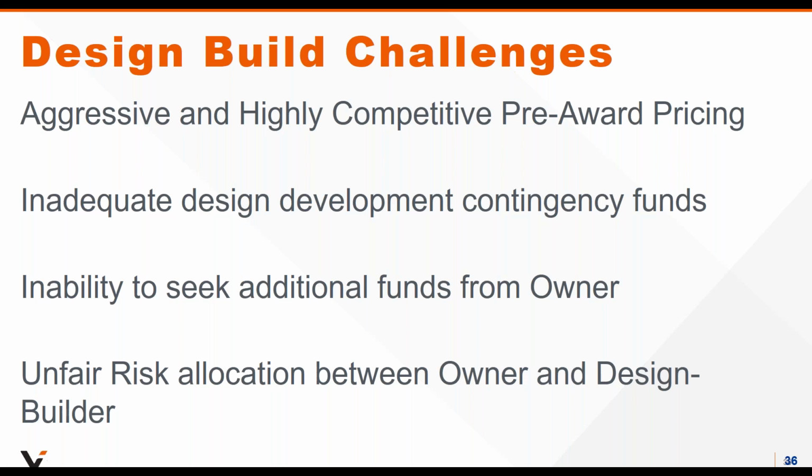And once that's locked in, there's not really the ability to pursue more funds. And this leads to fundamental challenges. Because it's an aggressive situation, there's oftentimes inadequate contingency funds in the bid because the contractor wants to win the job. And so once they win the job, they're not able to seek additional funds because the owner and design builder have locked that in.